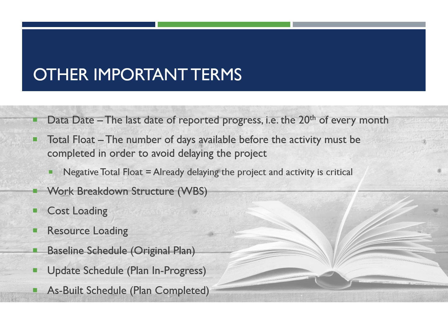Just for some vocabulary, here are some things you're going to hear out on the job site when talking about schedule. The data date. The data date is the date that was chosen as the cutoff date for reporting progress. We use this mostly for processing pay requests and things of that nature. What it does is set the same day for every month so that you have a consistent point to measure from.